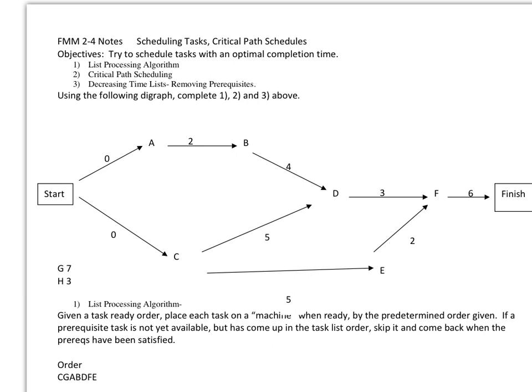So first of all, when we did our critical path analysis on this same thing before, we found out that the longest path was this path which took 15 units, so this would be the longest path, so this would be our earliest completion time. If we can finish in 15 time units, let's just call them minutes, 15 minutes, what that means then is that that's the optimal way that we can do this process. If it's more than that, we're not hitting optimal. If we can have our best, we're happy.